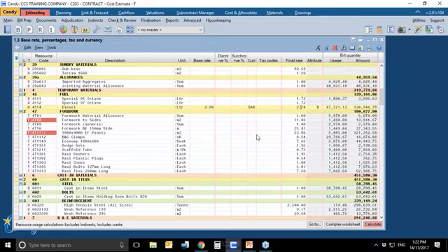You could also have other factors affecting your final rate. Things like surcharge. You want to add a surcharge. Let's say I want to add a 15% surcharge on this. So now you notice your final rate is now changed from 2.74 to 3.16. Why?